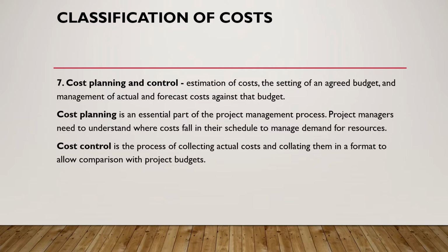Cost control is the process of collecting actual costs and collating them in a format to allow comparison with project budgets. Cost control is necessary to keep a record of monetary expenditure for purposes such as minimizing cost where possible, revealing areas of cost overspend. Its information is fundamental to the lessons learned process, as it can provide a database of actual cost against activities and work packages that can be used to inform future projects.